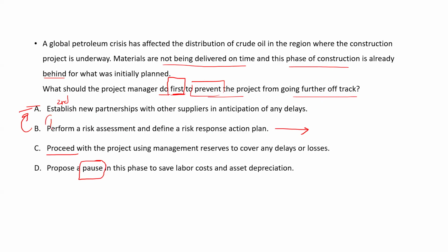But the first step is what? Perform the assessment of how much it will impact. Can you bring it back or not? The impact analysis. Then we can go for the future for this. If we go with this type of situation after the plan, what is this strategy? We have avoid, mitigate, transfer, accept, escalate.